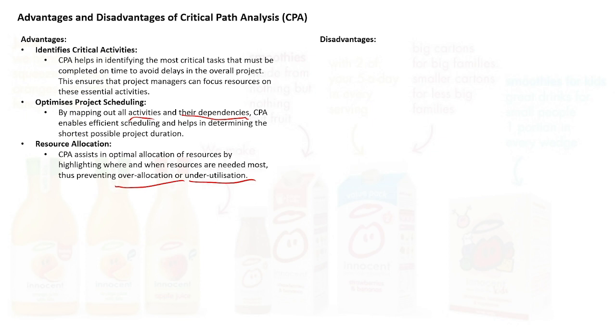Staff, we could have staff waiting around for that float time. If you identify float time, is that for quality checking? Is that staff being allocated to another part in the process? Have we got multi-skilled staff? Or is this just an IT professional that we're getting in? What happens if there's a delay and I've contracted with an external provider to come in and do my IT? They're still going to bill you. They're expecting to start on a certain day. It's not their fault you're late.